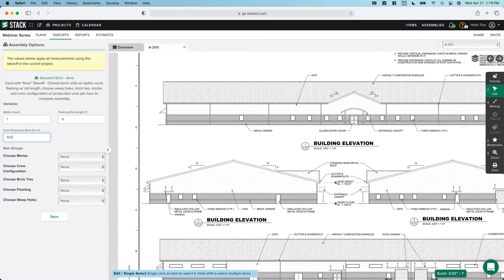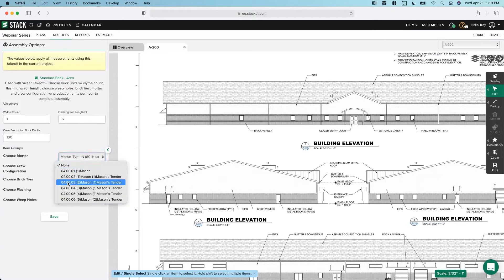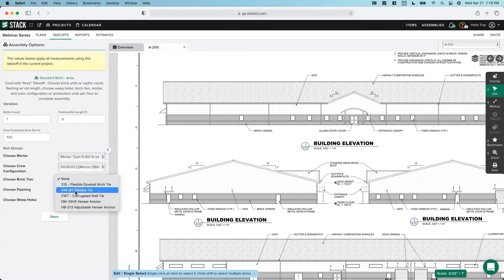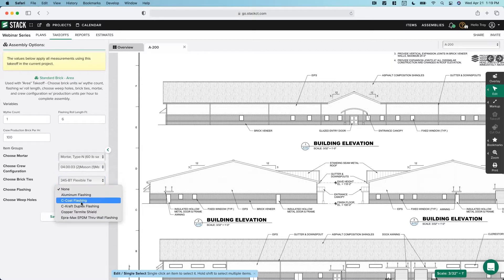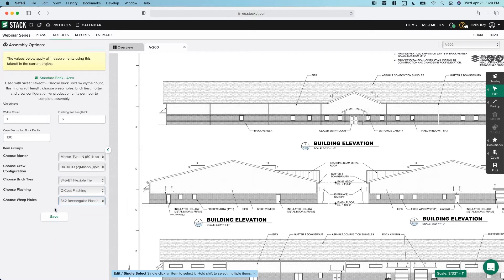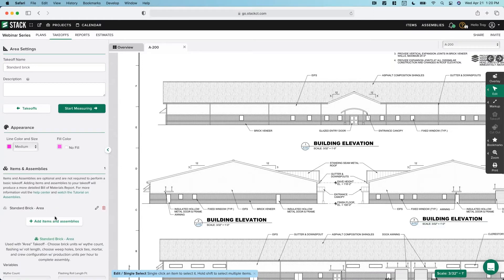I'm going to add my assembly, and it's going to ask us some questions. Our assemblies are all set up in a very similar way — we'll have some inputs above, and then we'll have materials to choose from down below. We can say we're going to do one layer, add our flashing, and set our crew production per hour. We're going to really slow down and take our time with this in the next session. I'll quickly select our materials, our crew configuration, grab some brick ties, my flashing, and save.